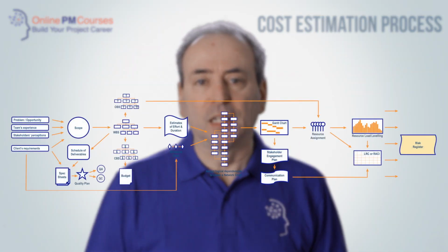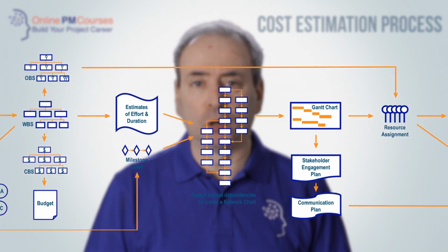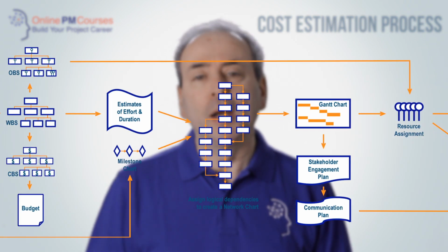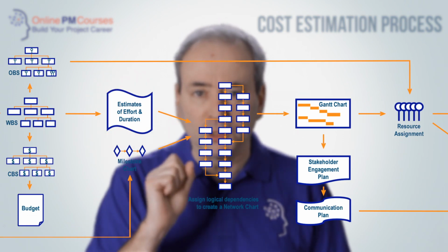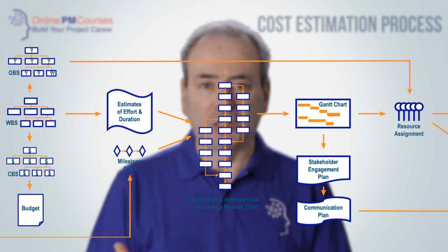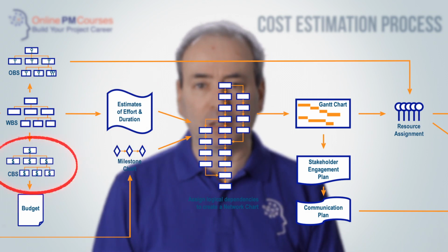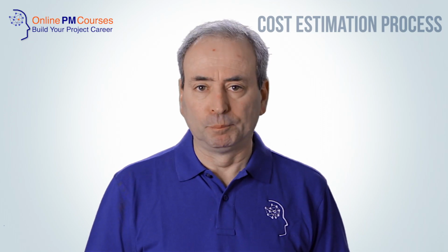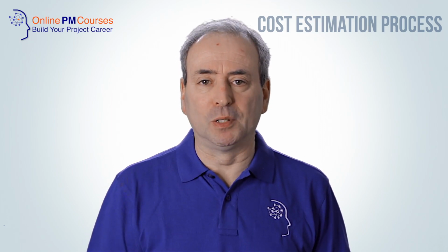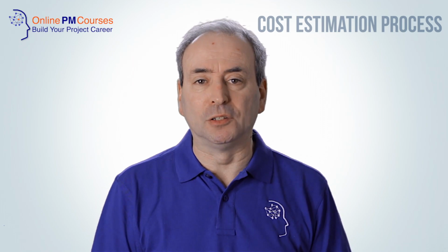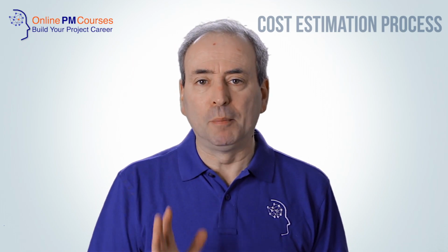And from that, you can allocate people into the roles to do the work, and when you combine the time it will take with the cost of each of those resources, that starts to build up a cost estimate for the work that it will take. But there are other resources as well. And for each piece of work, you can also overlay the materials and the equipment and the assets that you need to do that piece of work and to put in place cost estimates from those.